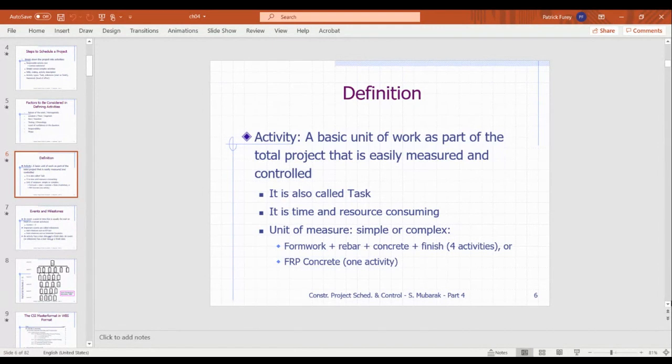Obviously, that's when you turn to outside contractors, and you fill in your resource gaps with outside or independent contractors, temporary labor, or some form of responding to that big resource need in a month and a half or two. Because there's only so much overtime you can assign that is productive, and there are lots of other factors. You don't want to be hiring people and laying them off all the time. That's not good for anybody.